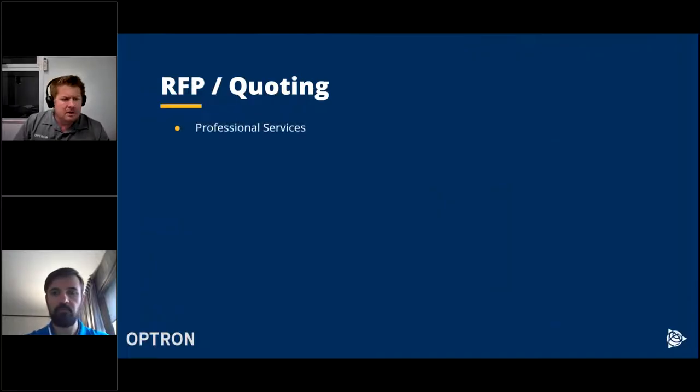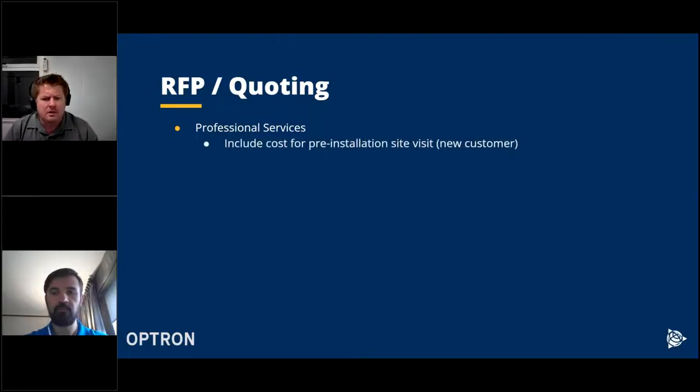Okay, so then we also need to look at the professional services that need to be offered. First of all, it's always a good idea, if it's a new customer, to include the cost for a pre-installation site visit. Preferably, you want to do this site visit even before you provide your final quotation. During this site visit, you can clear up a lot of the items that we discussed in the previous slide, and the customer will also be much more aware of what will need to happen on site. Sometimes we can also make recommendations of exactly where to place the monitoring stations.